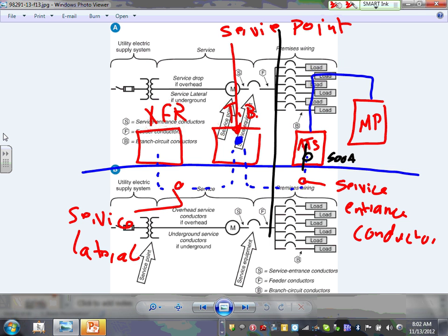Can I get a thumbs up, Chad? We fully understand the responsibilities, especially our ECDM students. I know you guys know it, the electricians, but you guys understand fully the responsibility, who's doing what. This is a big deal. When you guys start taking off the projects for me in the spring, are you going to take off this wire here and conduit? No. Are you going to take this box off? Yes. Are you going to take this conduit and wire in here? Yes. And of course, everything inside the building.